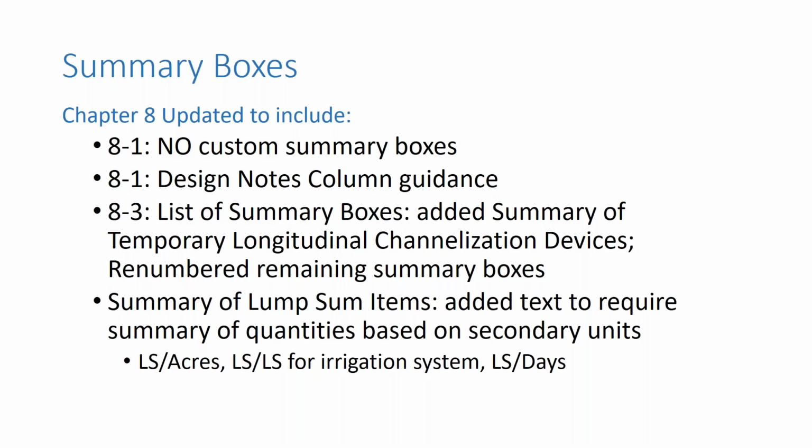Finally, on our lump sum days, for example, our lump sum for maintenance of traffic, we want to ensure that the contractor knows how many days that we are anticipating based on all of our project estimates there. It provides them a basis for producing their lump sum bid price.